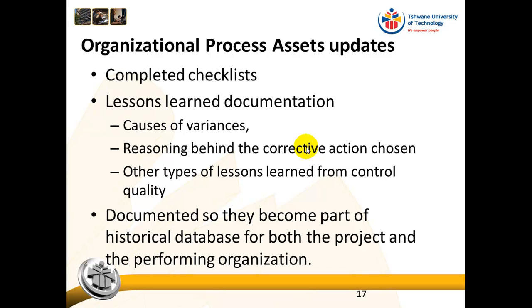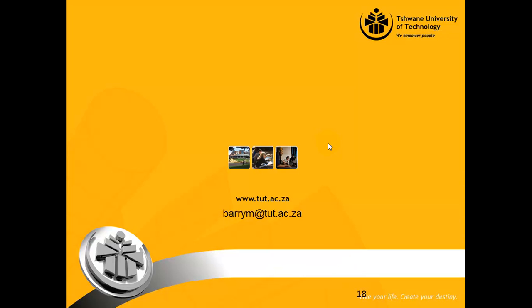They are documented so they can become part of the historical database for both the project and the performing organization. And this is where, if we have a project management information system that captures lessons learned, it becomes really helpful, because we can then put those lessons into our PMIS.